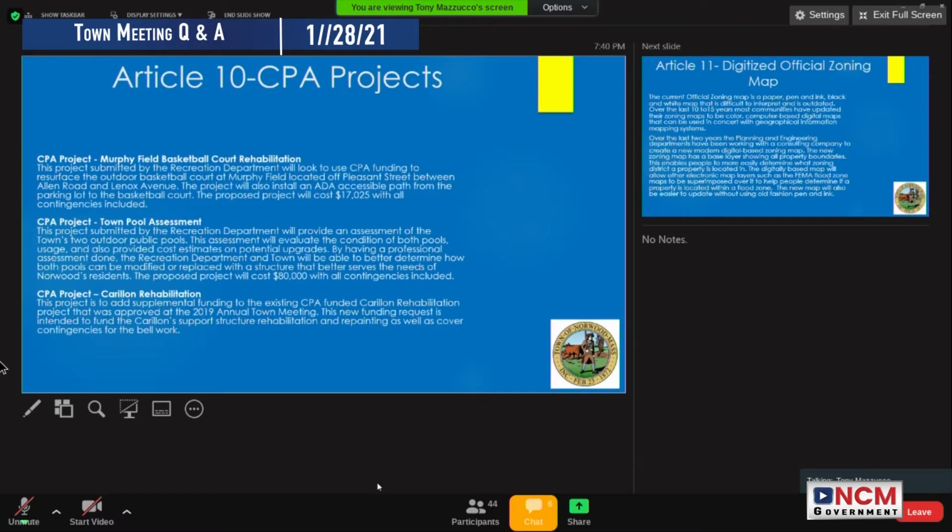One, we want to know what work the Morse House needs. Are we looking at just some cosmetic work? Is it $50,000 worth of work? Is it $100,000? Does the Morse House need $600,000 worth of work? I don't think that's possible. But once we know the full condition and what it needs, and we have an idea of where we want to go, that can inform the middle school project, because by the time we're at those construction and siting discussions, we'd probably be 18 months out, a year out. So it's a valid point, but knowing more about the Morse House, its needs and its possibility, would help us make decisions when the middle school planning gets to that phase.